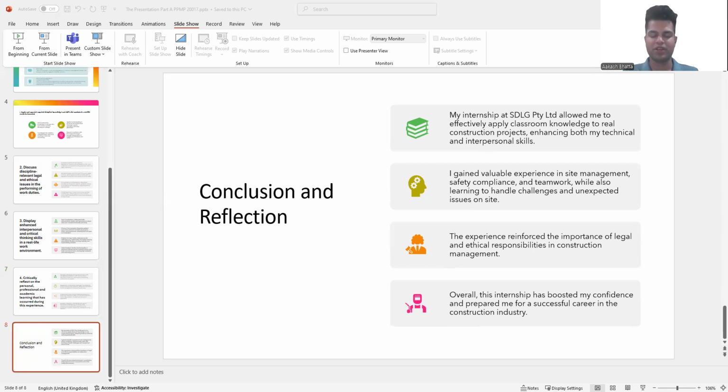We needed a depth of 20 millimeters, but we did a 40 millimeter depth. So we overestimated the quantity, and we had $6,000 worth of extra self-leveling compound, and we were not able to return it because they have no return policy.